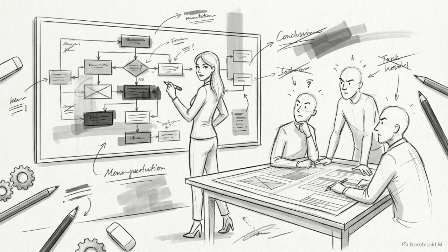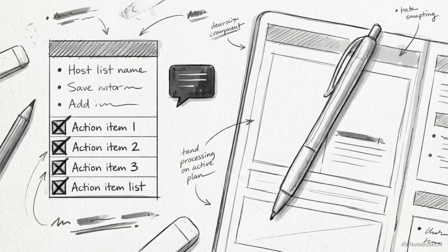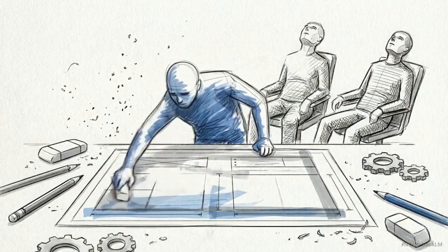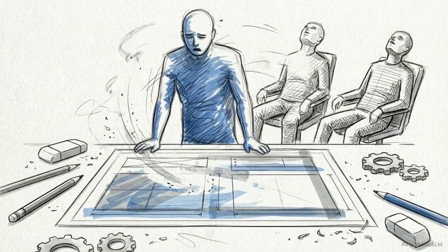Now, we tackle behavioral scenarios with question 6. What do you do when a product owner attempts to change priorities mid-sprint? Write down your exact steps. First, hold a conversation to understand the business urgency. If it becomes a pattern, facilitate a discussion on how constant changes damage the team's velocity and focus.